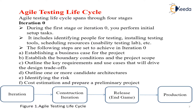During the first stage, that is Iteration 0, you perform the initial task. The initial task involves identifying the people for testing - you need to identify who will come for the testing process. Then installing testing tools: what tools are required? Who has thorough knowledge of those tools? If you know QTP, the functional tester, Selenium, or JUnit - those are the people who will be chosen.